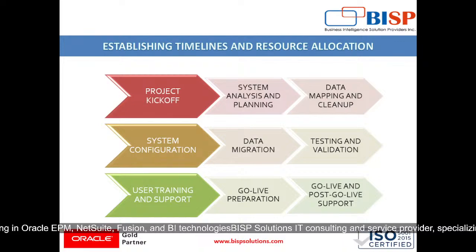And it also cleans up the redundant or outdated data for the same. Then system configuration, where it configures NetSuite modules and workflows, setting up of roles, permission and access controls is there, and it will take around 6 to 7 weeks.